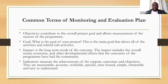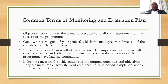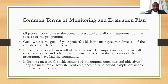And objectives. The objectives of a program are things that you can measure — when you're setting objectives, they're supposed to be SMART: specific, measurable, attainable, realistic, and time-bound. You don't come up with objectives you cannot achieve. For instance, if you have a 1 million fund but you want to reach almost a thousand schools, that is not attainable. When you're setting objectives, you must be within the SMART criteria.